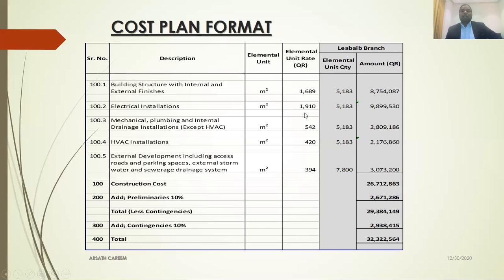When you say cost analysis, it's an examination of the cost of each function of the building from previous completed similar projects. It's very important. You have to do cost analysis for similar projects, and you need to do some adjustment based on factors, for example location, time factor, risk assessment, contingencies, which we will discuss later.